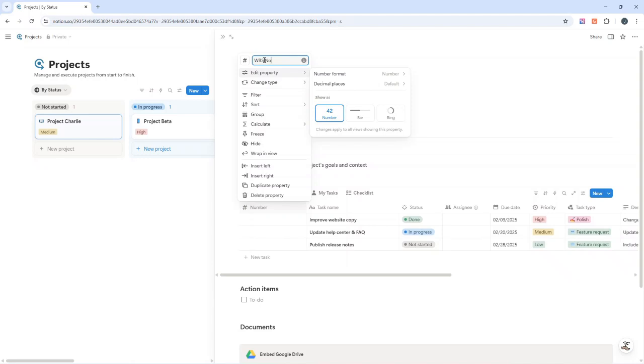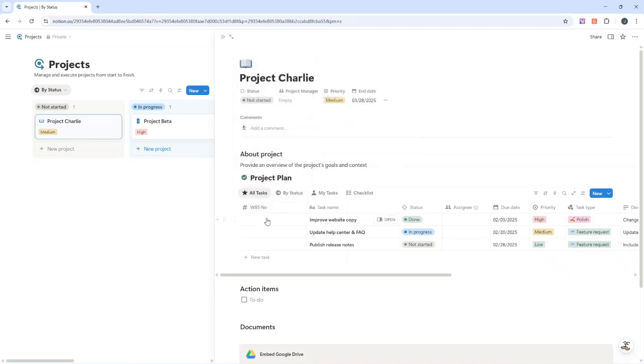structure number. What this does is this gives us a hierarchy in terms of the tasks, and we can differentiate between parent tasks, subtasks, milestones, etc., phases. We can do all of that with WBS. So as an example, I'm going to be changing this task name to Project Conception and Initiation. Okay, and that's going to be number 1. That's the first primary phase of this project, using kind of project management terminology.